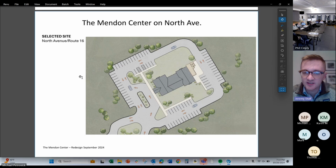So for something like a fire station, yes, it's this project now because we've done the feasibility, we have the identified land, we have the identified need. We've gone through the studies for it, and a fire station is possibly, right, not going to commit any future board to anything, and any future town meeting to anything. But it's part of the process, and we need an identified need. We need a long range plan for the department. We need to invest in a feasibility study and identify land and all those sorts of things.